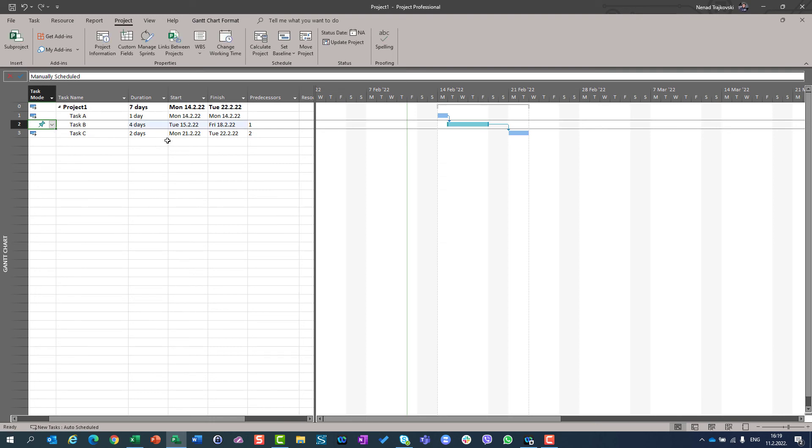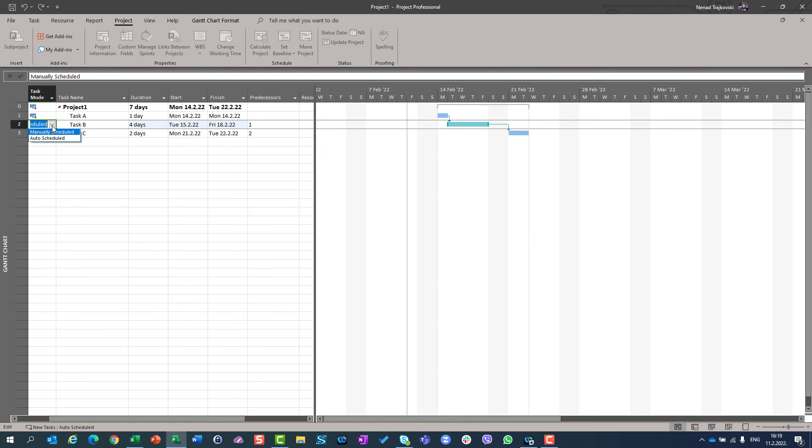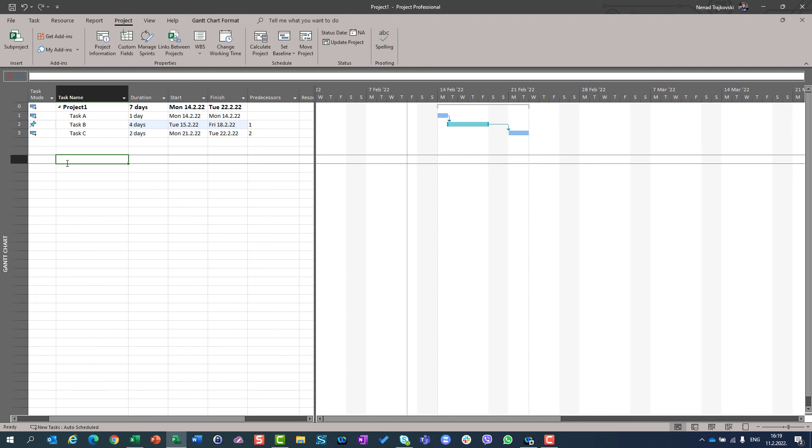which is manually scheduled when you don't have enough information. But as soon as you collect those information, then you will have to change that task type mode from manually to auto-scheduled mode. And the time when you